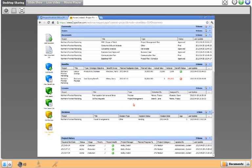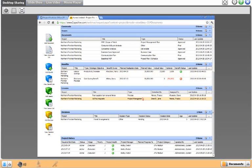Moving through to the next section: beyond standard entities like costs, issues, risks, scope changes, and documents, PPO supports six custom entities that clients can define themselves. Pre-configured options include benefits, lessons learned, decisions, and stakeholders. In the benefits log, project managers can record planned and achieved benefits and measure their status. The lessons learned log records and stores lessons from each project. The decision log records decisions, and in a more mature environment the approval functionality can be used to approve decisions online.